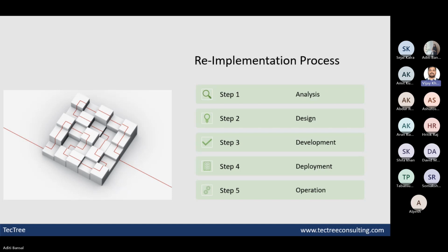In the re-implementation, we do a quick analysis. It's not the detailed analysis, because detailed analysis has typically been done at the time of the Navision implementation. So we do a quick analysis, then design, and then again, it's the standard Microsoft methodology: design, development, deployment, and operation. That way we complete the whole end-to-end implementation. But this is a little fast track, because if a person is already using Navision, they already know what is there in and out, except the new features and their current challenges. Apart from that, it's going to be more or less similar. But definitely the user interface will change, the new features will get activated, and the cloud competencies will get activated. So this is how we do re-implementation.